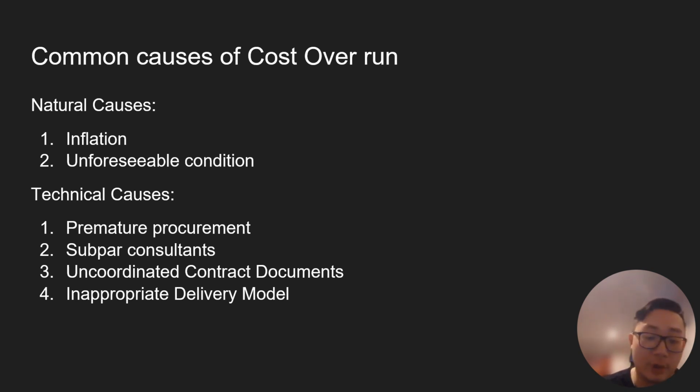Second, subpar consultants, and that happens a lot. I actually personally dealt with a lot of them. You have consultants that don't know if something is buildable. It might look good on paper, but because it's not buildable, you end up spending more time on it, and you have to invest more management time on it to make it right or help the consultant to get to that working detail.